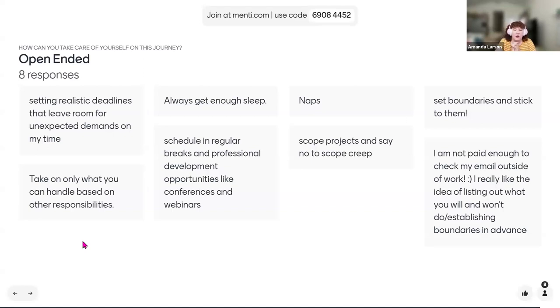Also, if you have an author come and say, I'm going to publish 3 textbooks this summer, the answer to that is no. No, they're not. They have no idea the scope. And I mean, maybe if they already had them written, you could help them put them into a publishing platform and do that. But that would generally be a pretty solid no, let me talk you into, we'll do one at a time situation. And I think you'll figure out your boundaries as you sort of start doing this work.